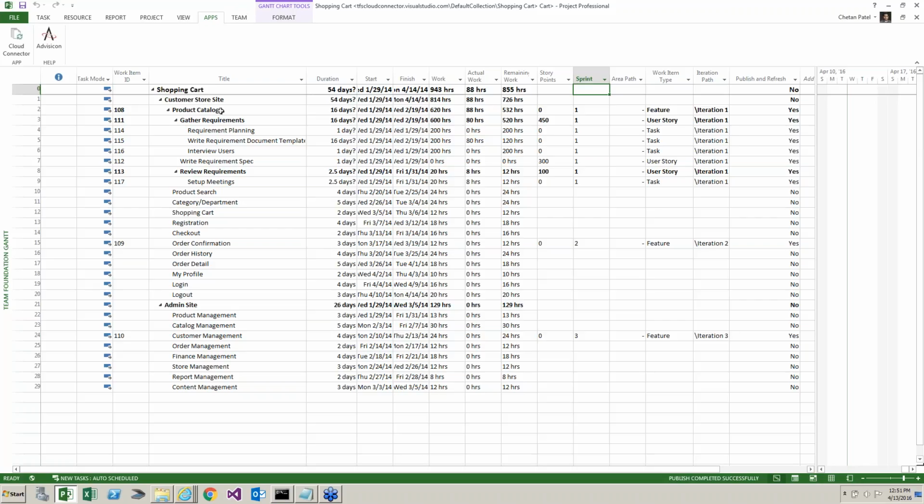So if there is a task, a user story, and a BA assigned to the user story, and then each task gets assigned to different people, you assign them in VSO, and then those resources will come over here with each and every task. So I would go toward that rather than figure out who's going to be the actual person to do it, because your dev team knows who's going to do the different tasks.